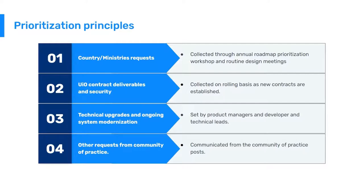For the roadmap and prioritization process we follow a ranking of four kinds of inputs. First, country and ministry requests, collected through the annual roadmap prioritization workshop and by attending routine design meetings on specific features and functionality that have been requested. Second, contract deliverables and security requirements that come through the various partnerships we have.